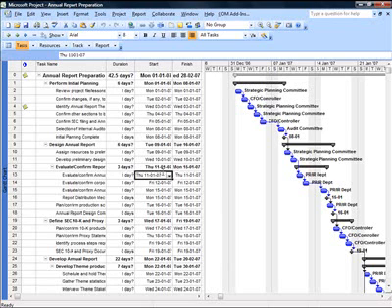Once my raw plan is ready and I'm all set to kick it off, at a later stage, I should know what was planned and what is current. If I want to know the variance between planned and actual, it is very important to save a baseline. Saving a baseline is actually a key step in working with a project schedule. So first, let's understand how a baseline can be saved.